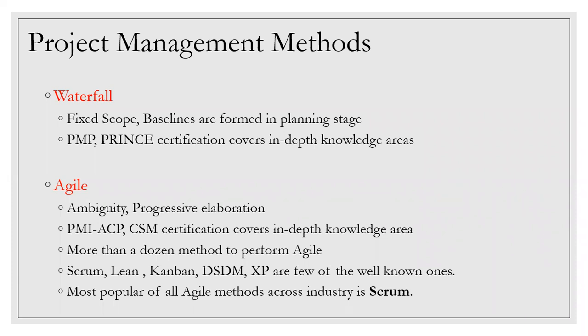So what happens is Agile works especially for products where they want to launch with a minimum feature list. So let's say they will define a big feature list for the product based on user stories, based on the requirements they capture from the market or by looking at their competitors. And once they build the feature list, like feature 1 to 100, then they will prioritize it. And then they will ask how fast can we launch the product? Because if we think that we have to include all 100 features in the product and then launch it,